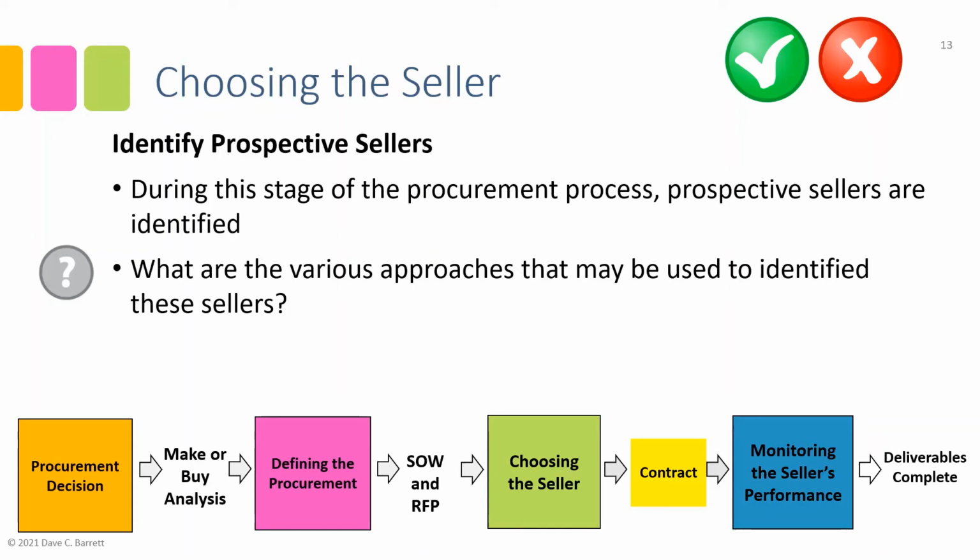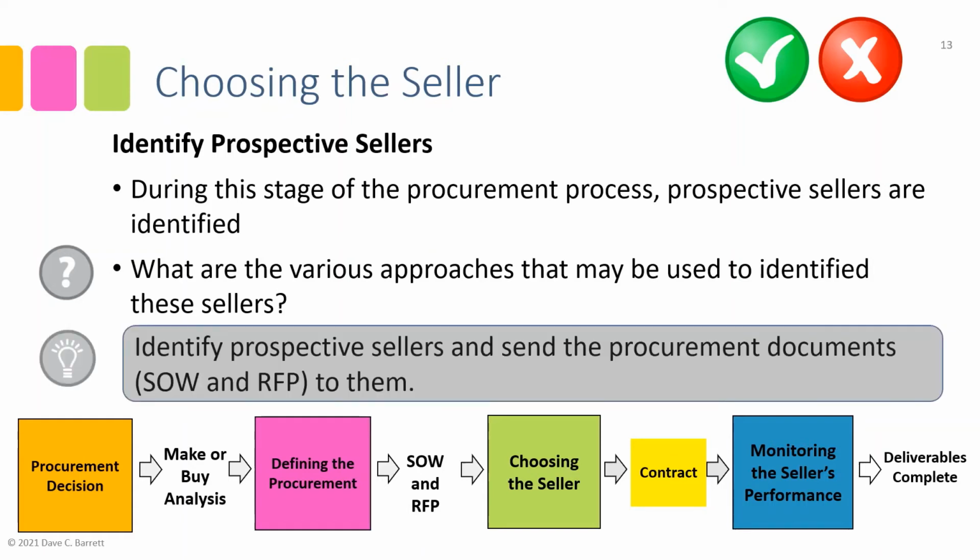A word of note: for public projects, where government organizations are the buyer, it's very important that this is a public process, that this is not done in secret, or that only certain companies are selected. It needs to be published in a publication that anyone has access to. So there are additional rules around this for public organizations like governments and so on that are required.